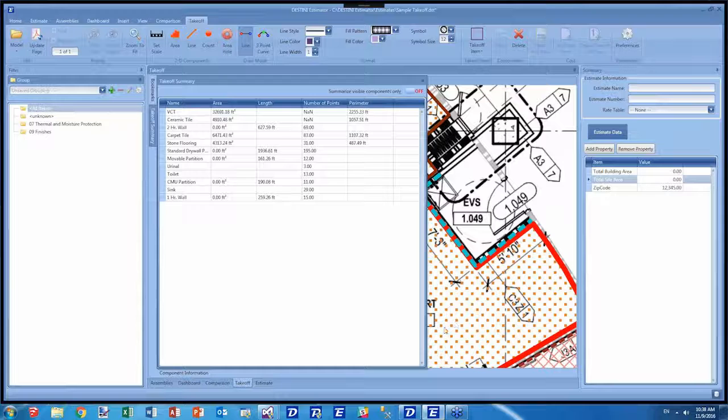Instead of tying one line item to many different components, it will actually duplicate a large number of items, and then because we already have that roll-up capability inside of our estimate view, it will always appear as one item no matter what you're looking at. So if I look at the fourth floor, I'll see the carpet tile on the fourth floor. If I look at fourth, fifth, and sixth, I'll see carpet tile for fourth, fifth, and sixth, and so it'll always roll up and always show you a nice, concise view of that item.